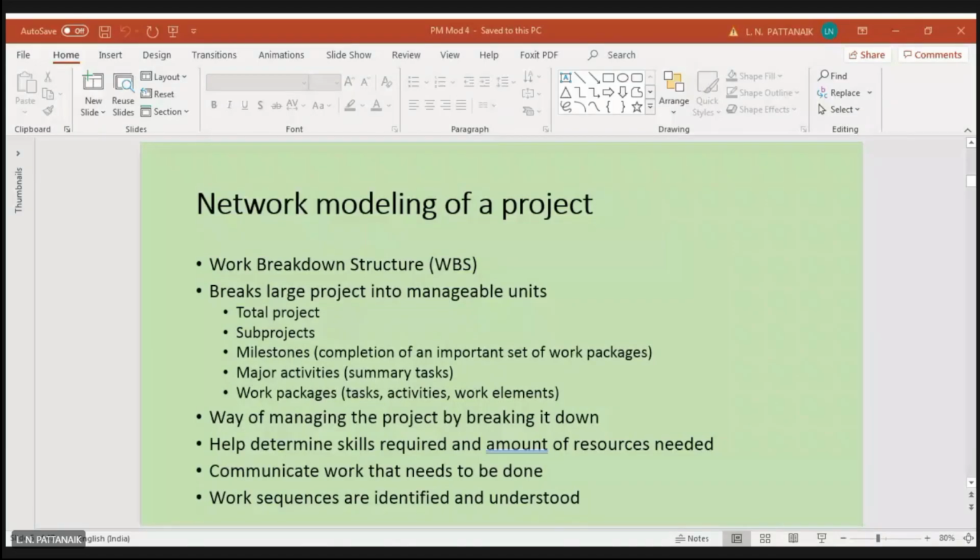Why am I saying it is skilled work? Because here you need to be very judicious in breaking the activities into some discrete units of work, right? You just cannot combine two different natures of work into one task. Again, coming back to that house construction example, for example, digging up the foundation is a completely discrete pack of work, right? So it needs some excavation of the earth and moving the earth out of that. So it is a completely different kind. You cannot mix that with some other task, right? So that is the meaning of work breakdown structure.